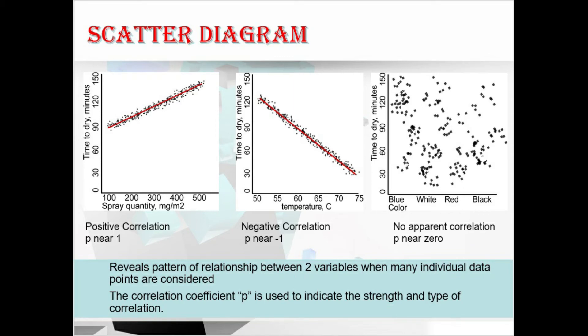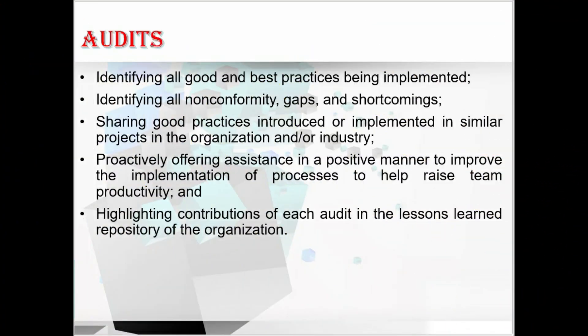An audit is a structured, independent process used to determine if project activities comply with organizational and project policies, procedures, and processes. Audits play a key role in quality management. A quality audit is usually conducted by a team external to the project, such as the organizational internal audit department, a PMO, or an external auditor to the organization.